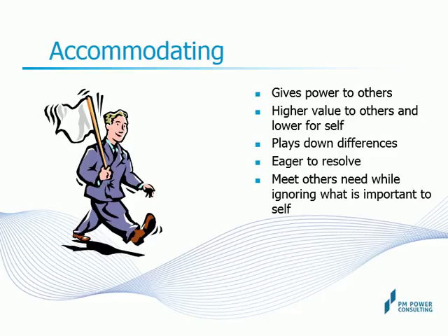An example? Let's say that the customer would like to reject a candidate for the project, although you believe the candidate is the right person for this project. You accommodate the customer's point of view and go along with the customer. Accommodating could also be useful in emotionally explosive situations, and accommodating the other person may help defuse it.